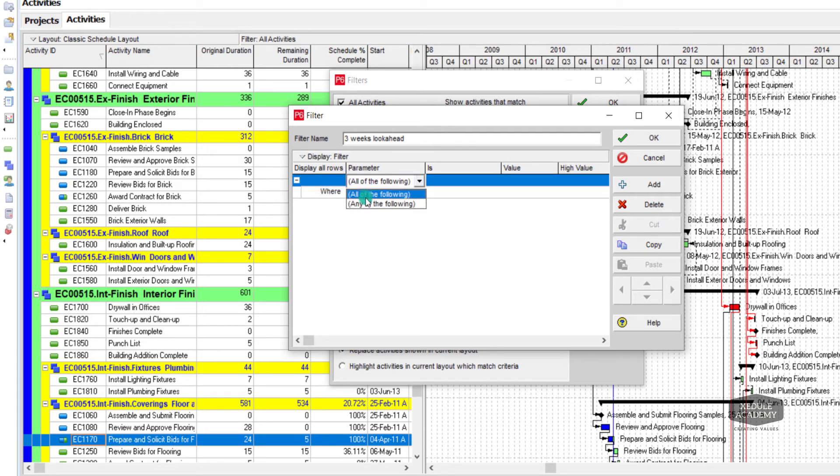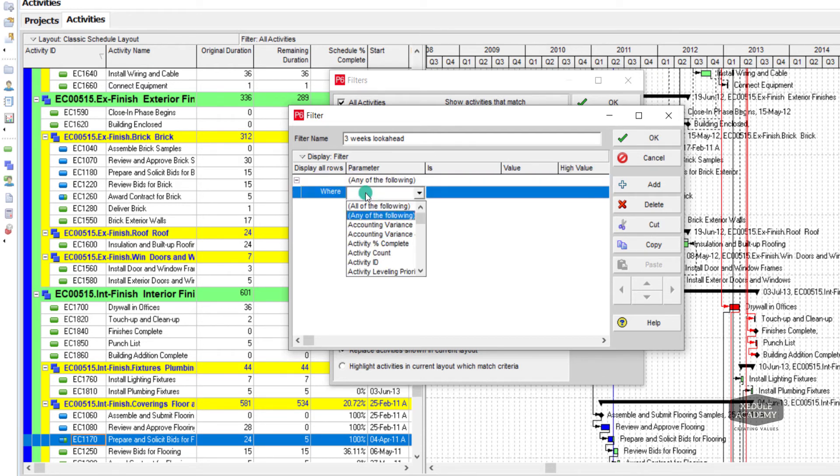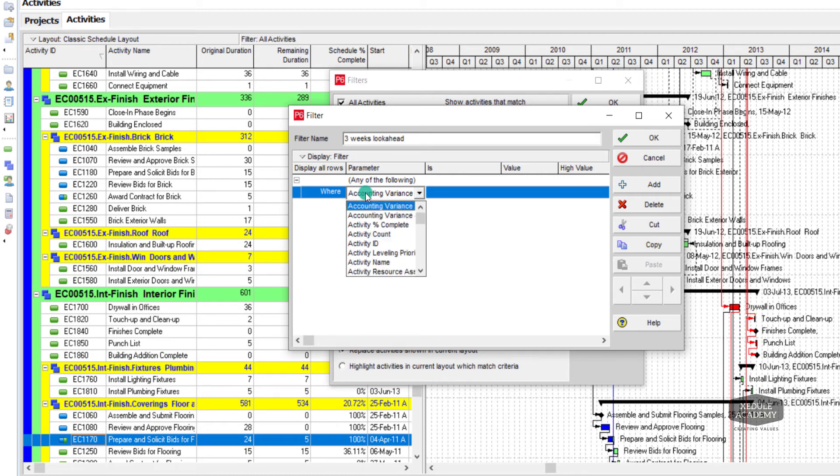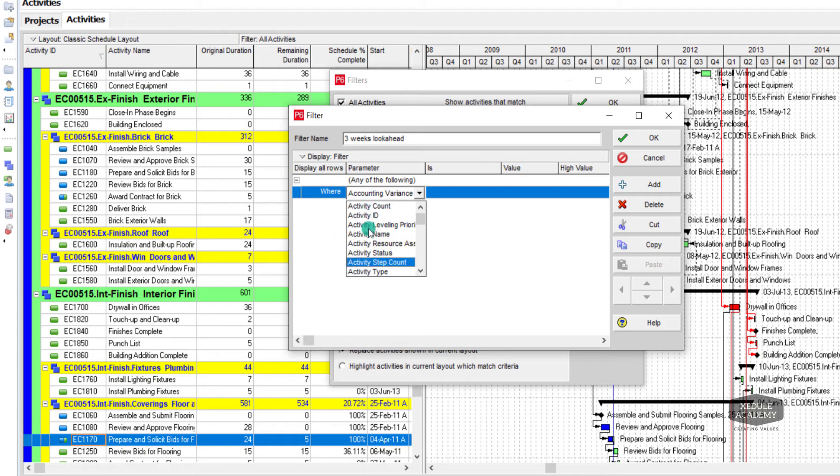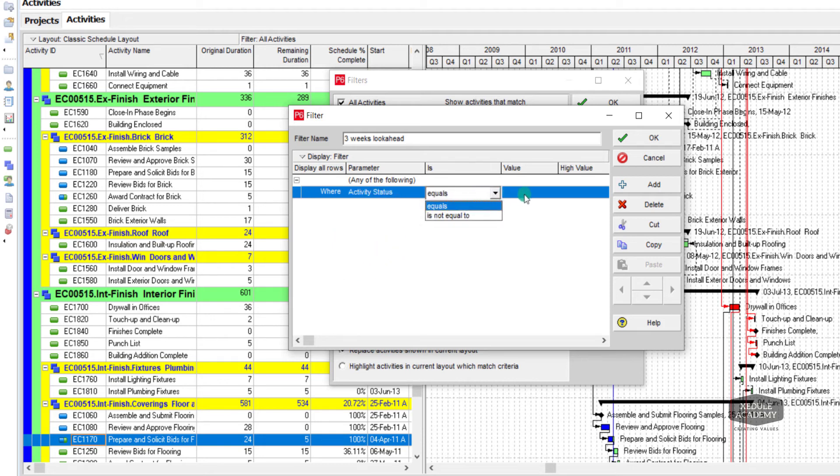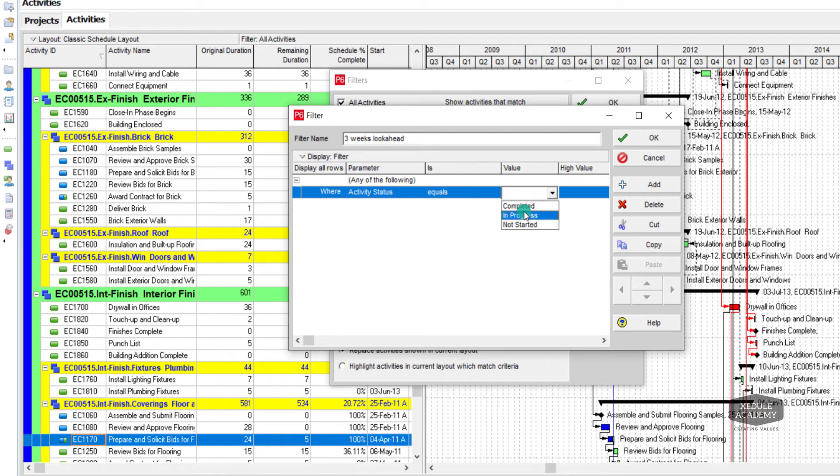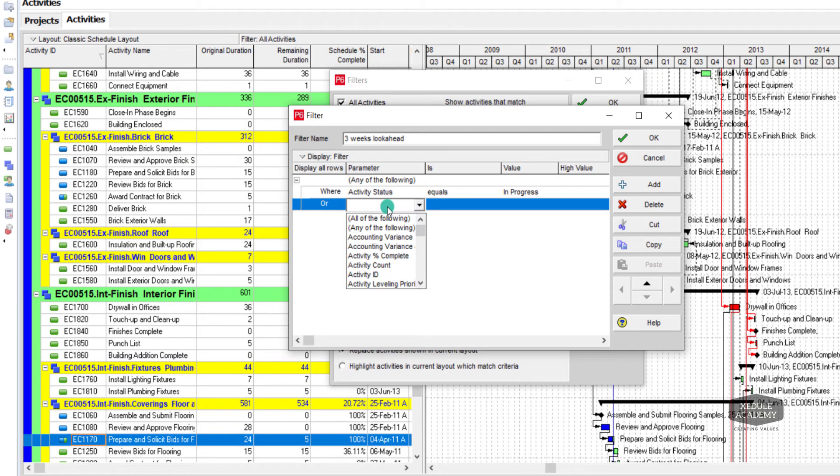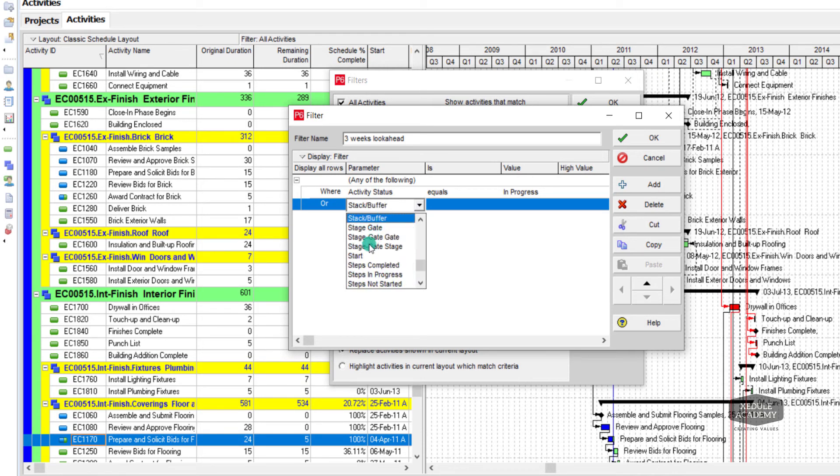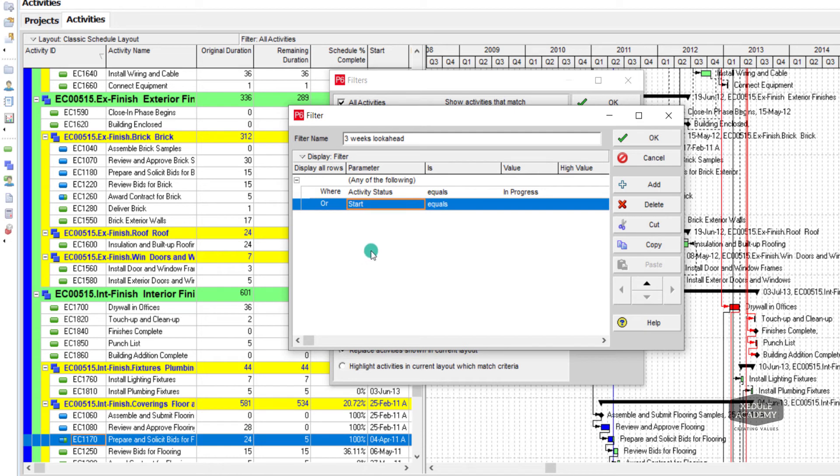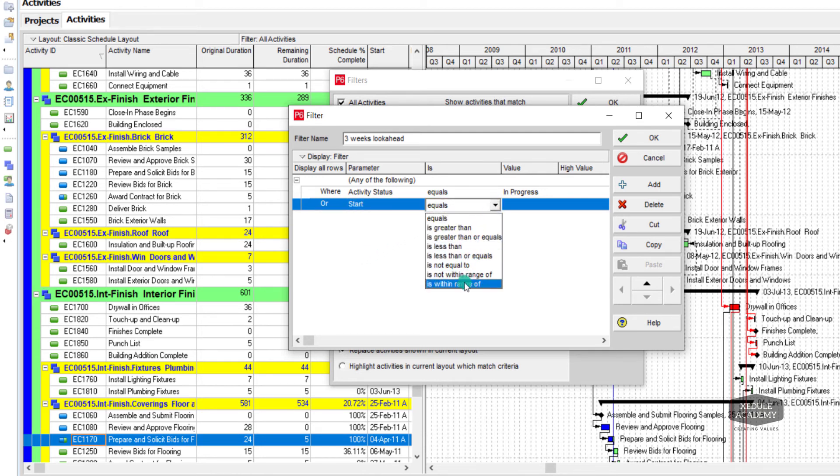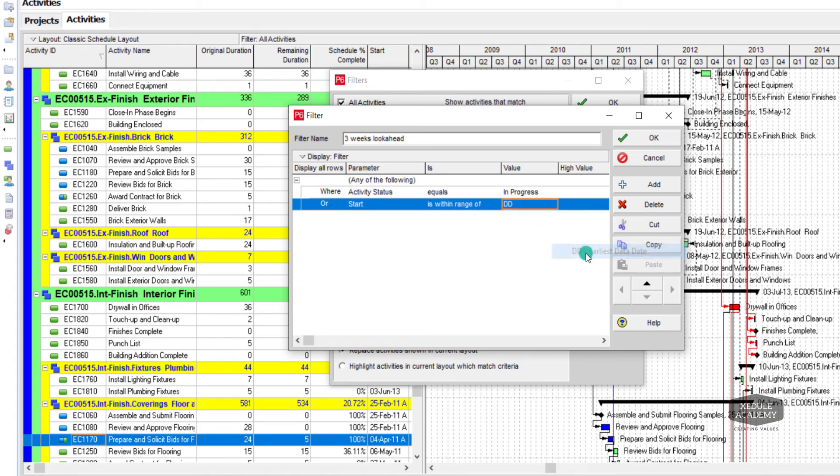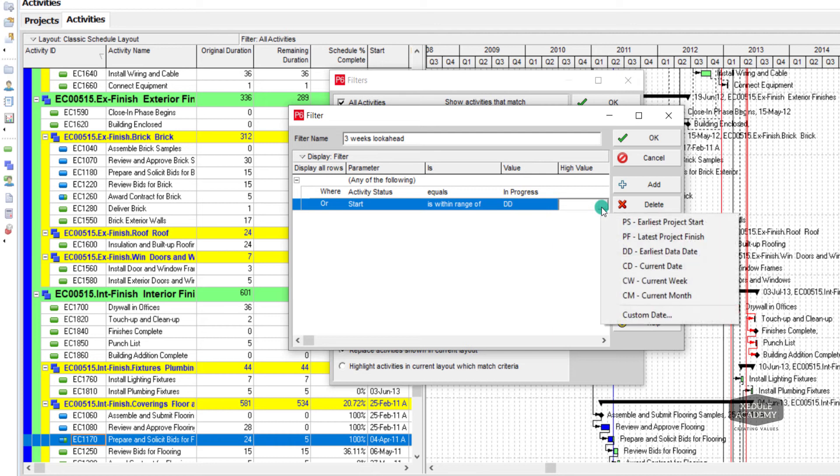Parameter should be any of the following: click on new while activity status equals in progress, click add, or start is within range of data date and three weeks from data date.